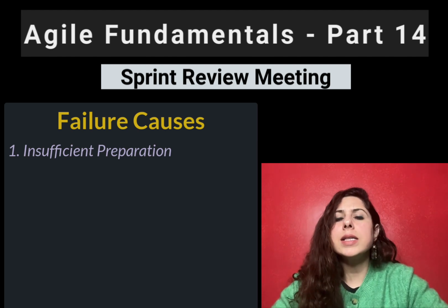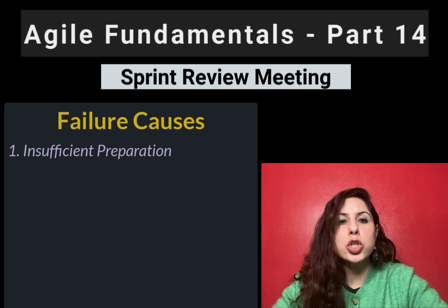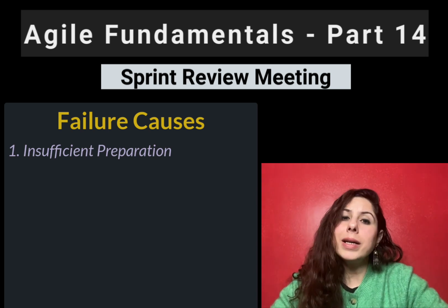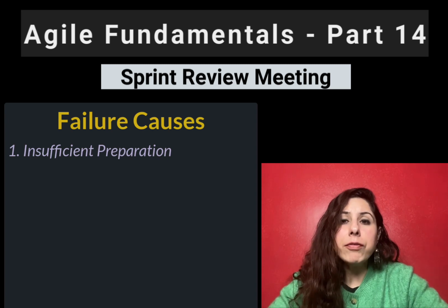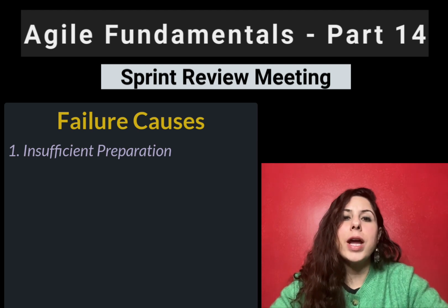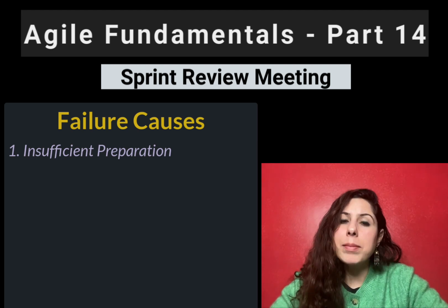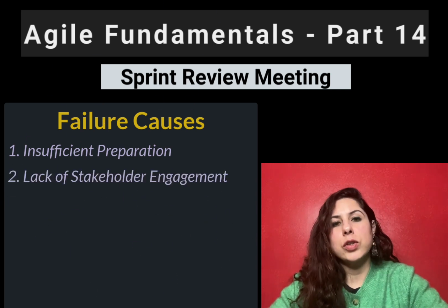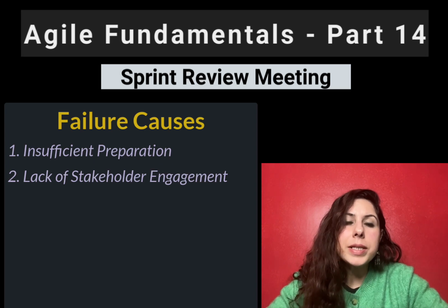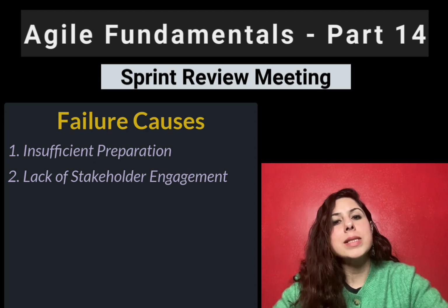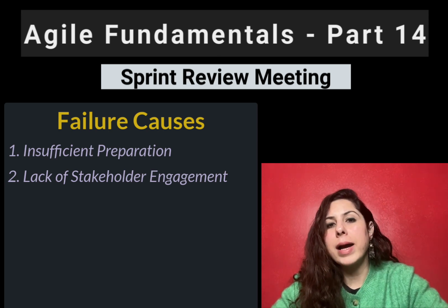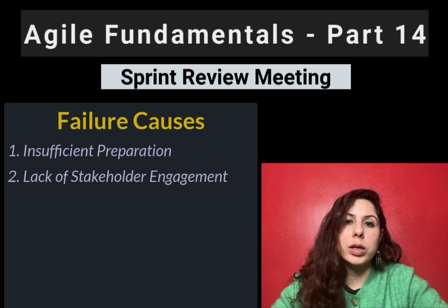For instance, consider a scenario where a specific module of the product requires a prepared environment for demo purposes. If this environment is not properly set up, it can lead to wasted time for everyone involved, as the demo may not proceed successfully. Second, lack of stakeholder engagement. Limited or no participation from stakeholders can lead to missed opportunities for valuable feedback and alignment on the product.